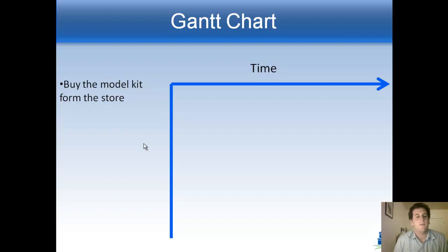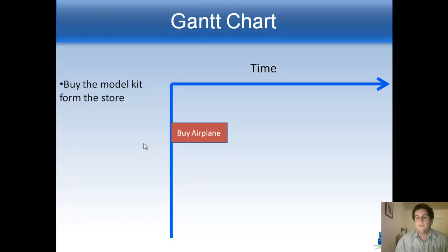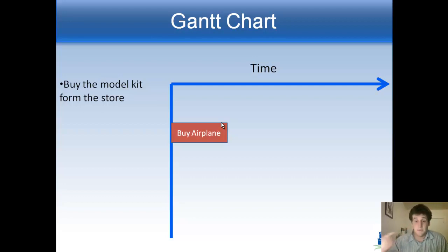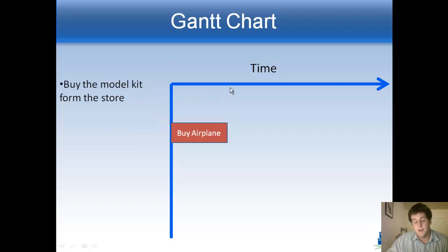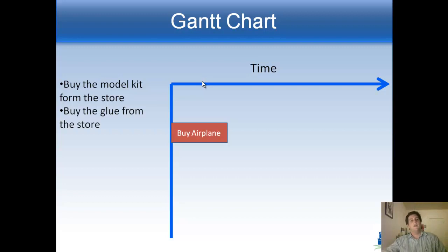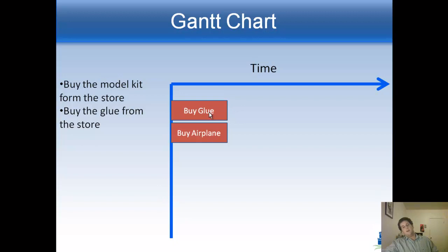So let's look at each of our little steps and how they would be represented on a chart. So for example, the first step in our steps for making this airplane is Dave needs to go to the store and buy the model kit. So we make a little block. It's going to take him a while. Say we don't have a scale here, but let's say that's like an hour or something. He's got to go to the store. Maybe he has to stop at the ATM and pick up some money. And so that means that's going to take some time. It doesn't matter exactly how much it is for now. Meanwhile, we have a second thing. Well, he also needs to buy glue from the store. And those two things can happen at the same time, right? He can get the model and the glue at the same time. So it's going to take the same time. He's got to go to the store and get it. So those things can happen at the same time.